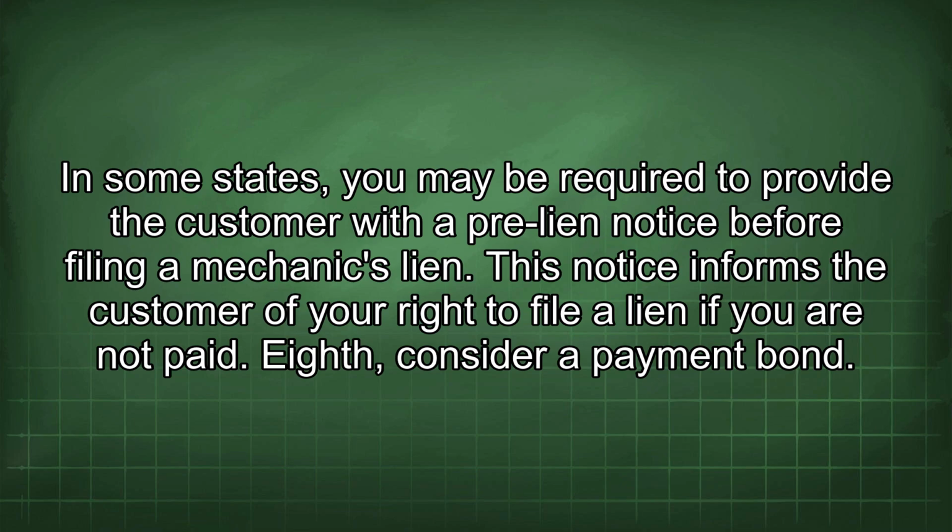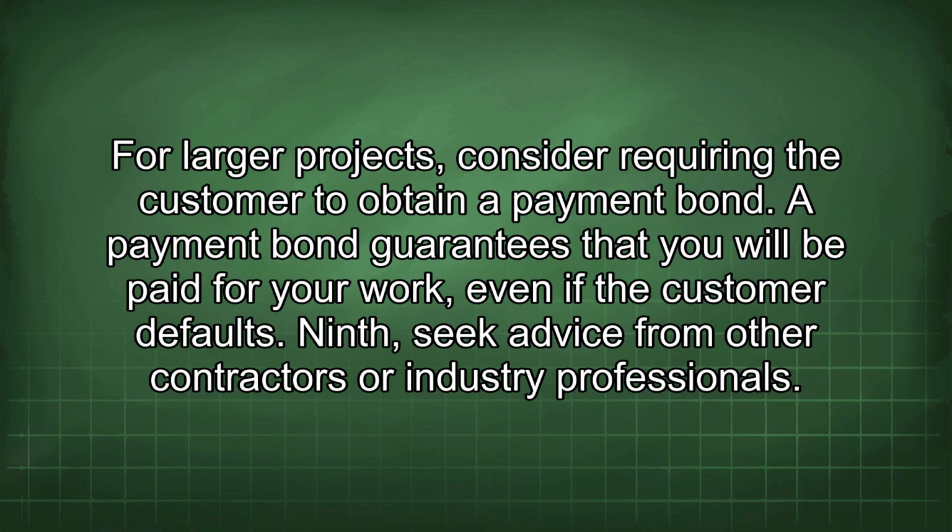Eighth, consider a payment bond. For larger projects, consider requiring the customer to obtain a payment bond. A payment bond guarantees that you will be paid for your work, even if the customer defaults.